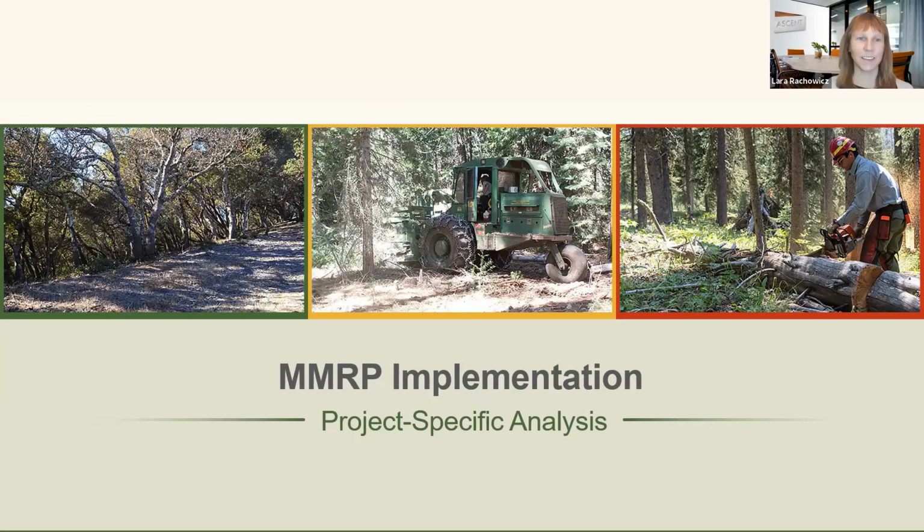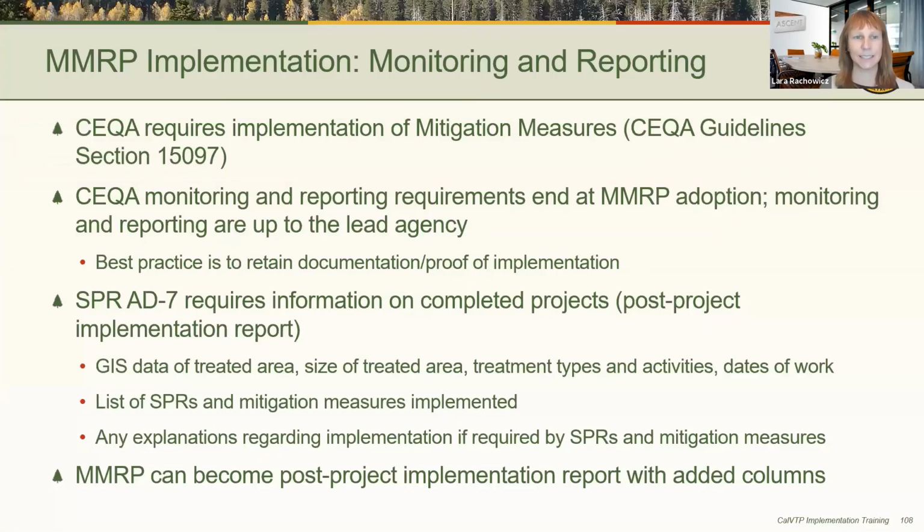All right, thanks, Heather. All right, next slide, please. So MMRP implementation. CEQA requires 2 things related to the MMRP implementation: that mitigation measures are implemented, and in order to ensure that they're implemented, that the lead agency adopts a program for monitoring or reporting on the mitigation measures.